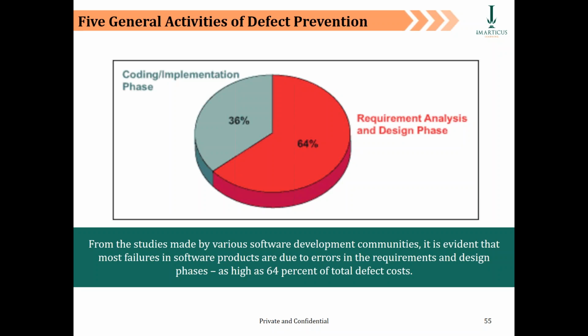And that is why, guys, fixing an error from a coding or testing perspective is rather simpler. But remember, if you have made an error in the requirements, don't forget the time it takes to go back to your stakeholders and get the rectification done. First, having the right clarity. Second, rectifying your as-is and to-be process flows. Third, walking the stakeholders through the different solution which has now emerged out of your requirements, because the requirement has changed, right?